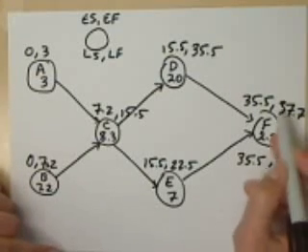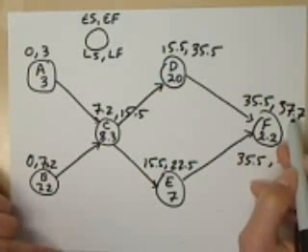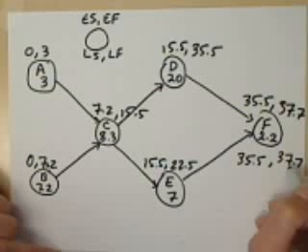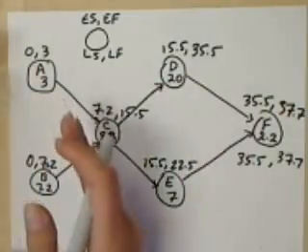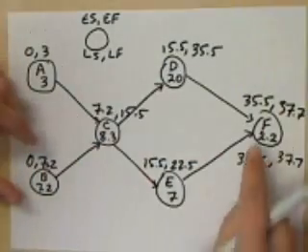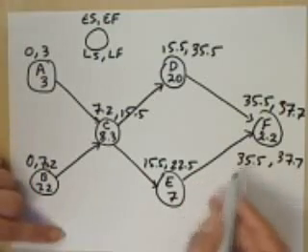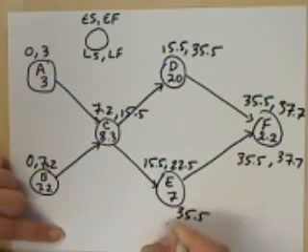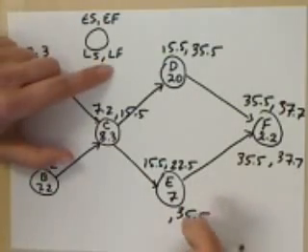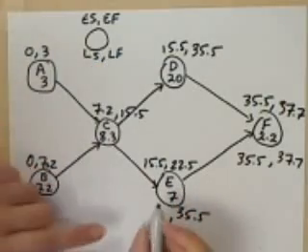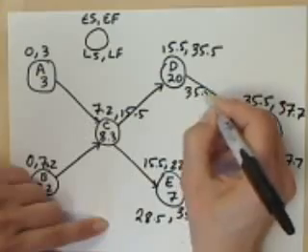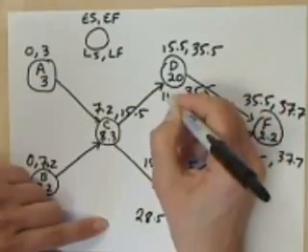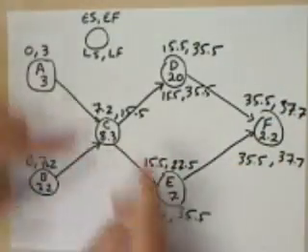So this is really the average earliest time that we can finish this project, and this is the average latest finish time that we can finish this project. So all of these times are averages, essentially, or expected values. Now, working it backwards, we put the 35.5 as the LF, subtract 7 from it to get 28.5. Do the same here, subtract 20 from it to get 15.5.